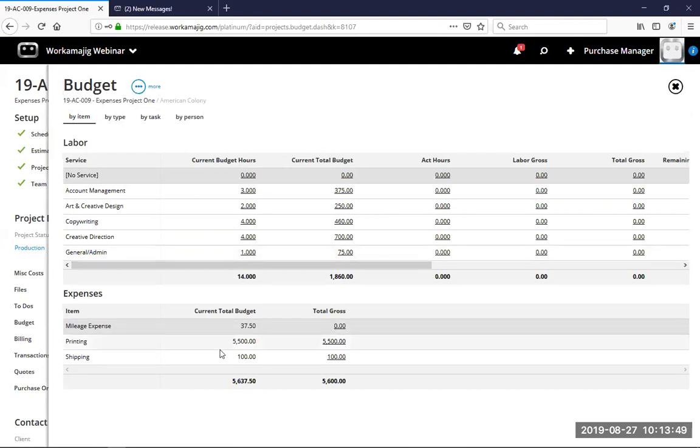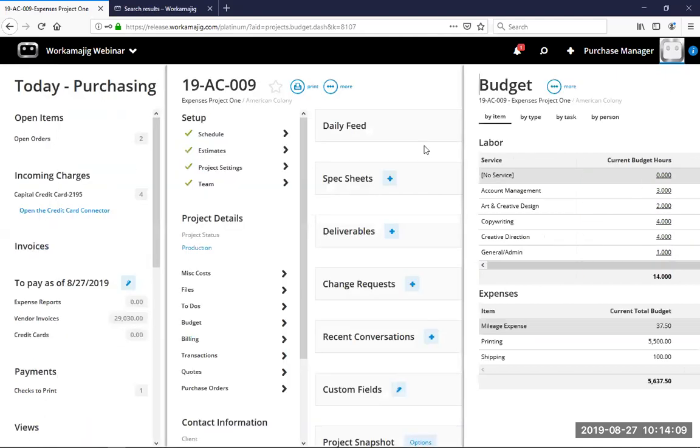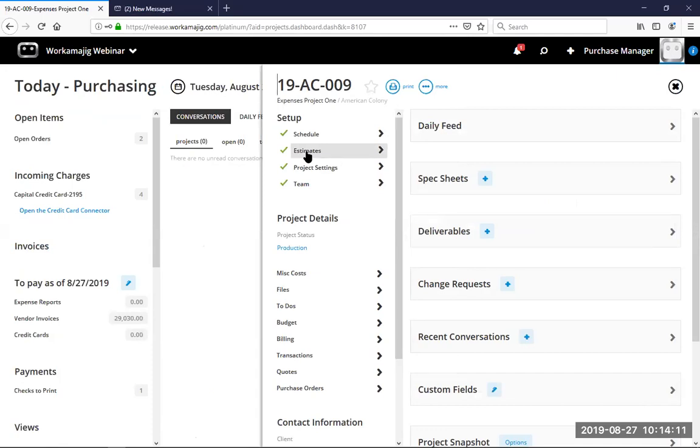This is the individual project budget. You, of course, have the project budget analysis that can go across all projects. But I can be tracking these to see, are we way over budget? Do we need to have a discussion, maybe a change order estimate, or if there's a scope change, maybe I need to estimate another expense that I didn't do initially. All of your approved estimates become your budget. So whether it's the original, a change order, or just additional estimates, they all become your budget.